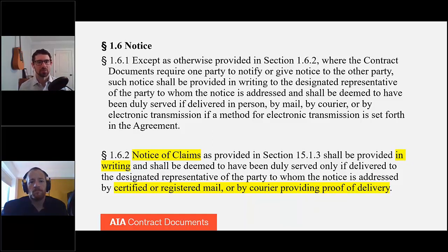So if you're receiving information from a contractor or an architect or a CM about a project, you might get an email about the type of molding that's going in a certain room, or then an issue that you might be having with the scaffolding delivery, and then you might be talking about tile color, and then slipped in there as another email, it might say just see attached, and then the attachment, lo and behold, is a $40 million delay claim or something like that. So it's set up that way to make sure that those types of claims are noticed, no pun intended, by the owner upon receipt.